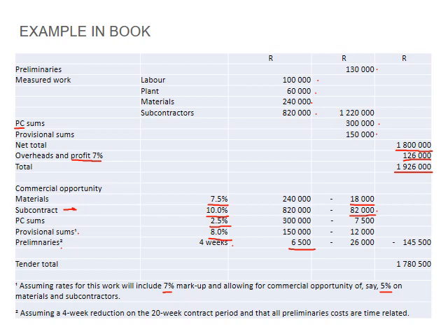Okay, so basically they said, okay, this is a project earmarked to be 20 weeks, but we're going to do it in 16 weeks. So we're going to get off-site earlier, and this is where contractors usually make the best or the highest amount of profit, is to actually get off-site as quickly as possible.